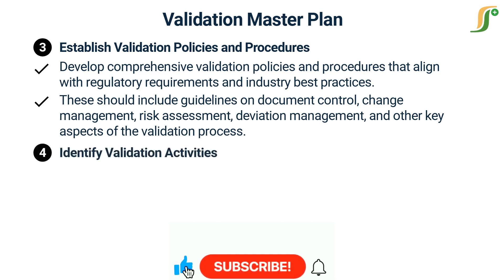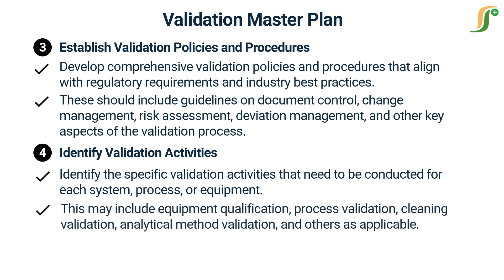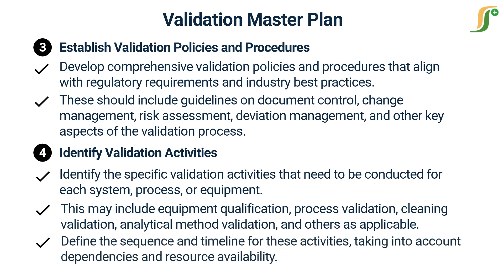The fourth step is to identify validation activities. Identify the specific validation activities that need to be conducted for each system, process, or equipment. This may include equipment qualification, process validation, cleaning validation, analytical method validation, and others as applicable. Define the sequence and timeline for these activities, taking into account dependencies and resource availability.